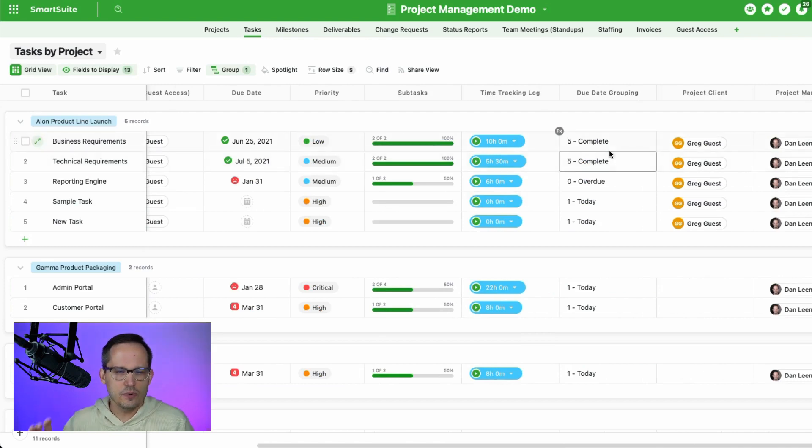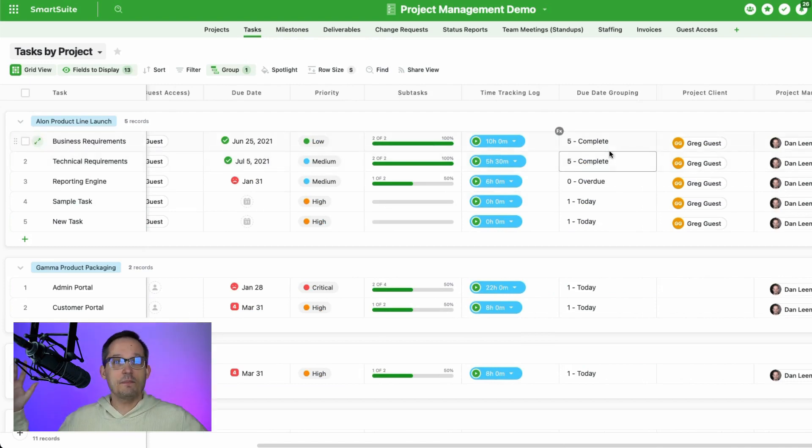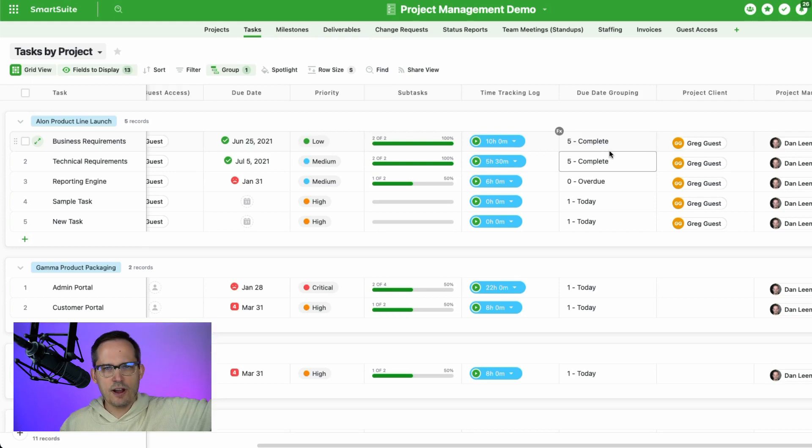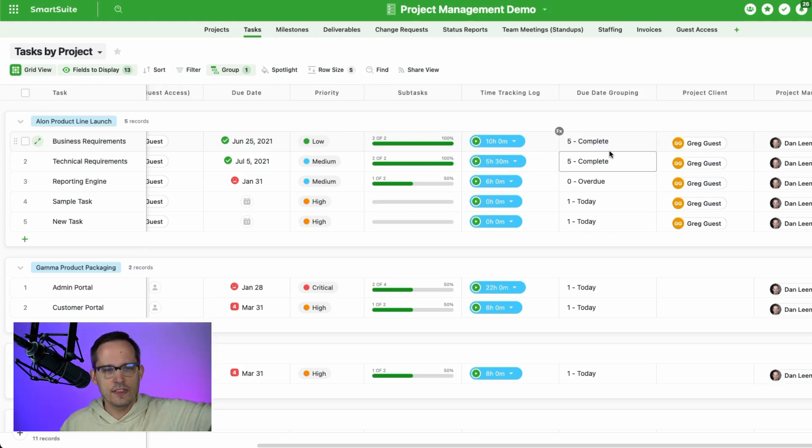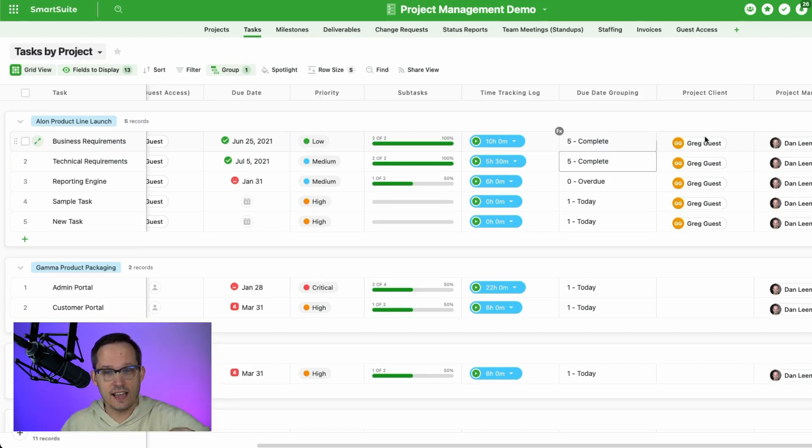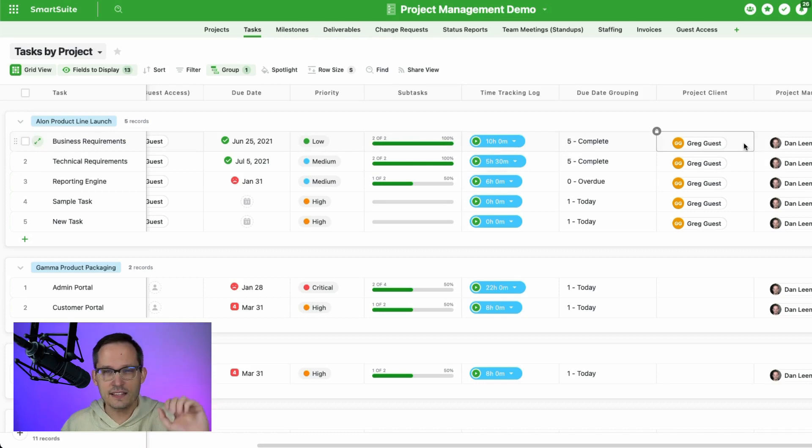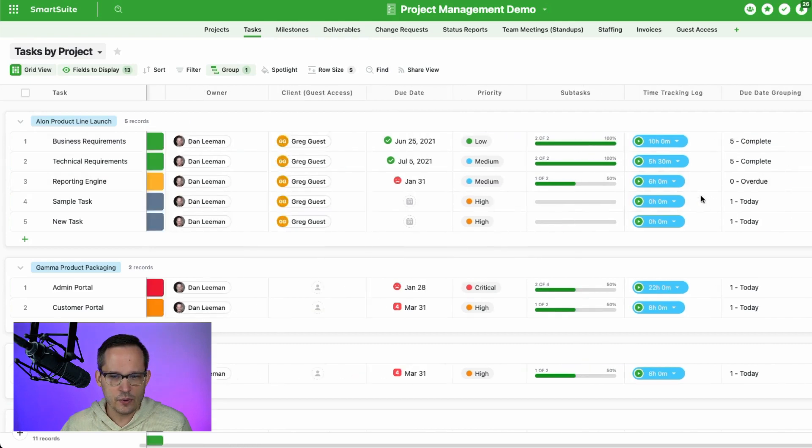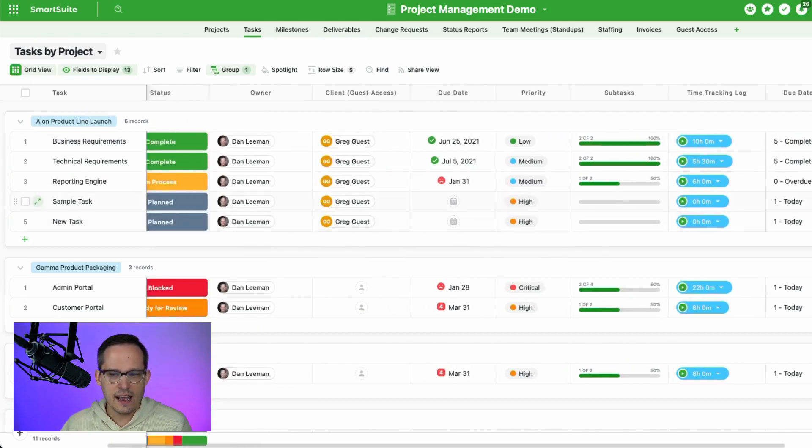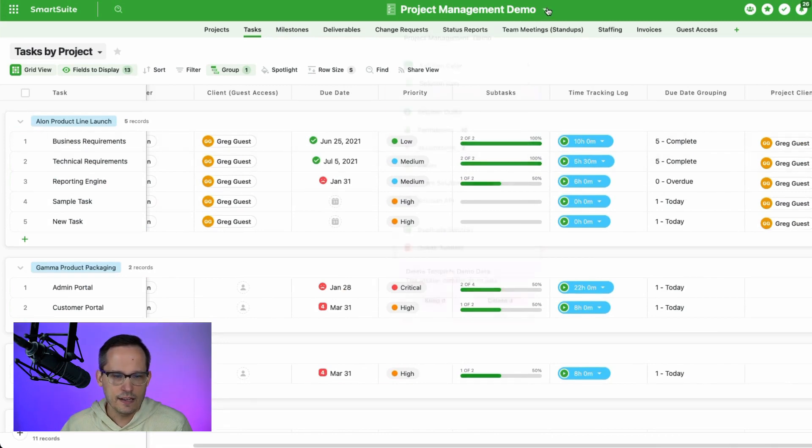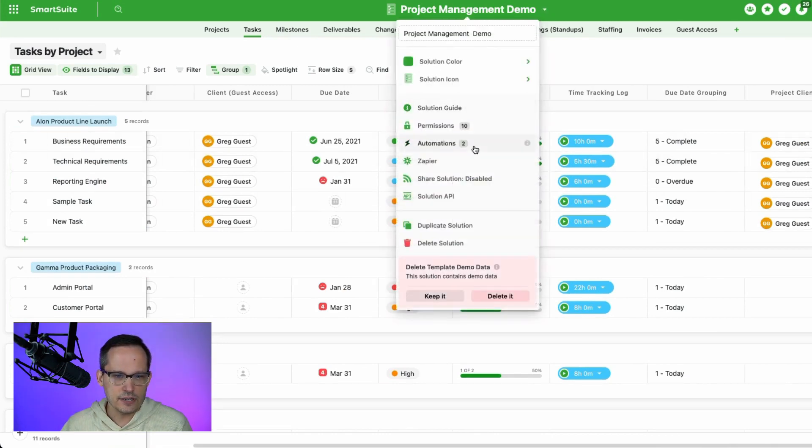So the way of thinking about this, if I'm to step back for a second and explain it is, at the project level, we know that we've assigned this to Greg guest. Therefore, if a task is created for that project, we also want the task assigned to Greg guest as well. That's the logic we're trying to build here. And so in this case, we need to have this lookup here so that we can say, ah, here's where who we're going to map it across to. And that's the purpose of that automation.